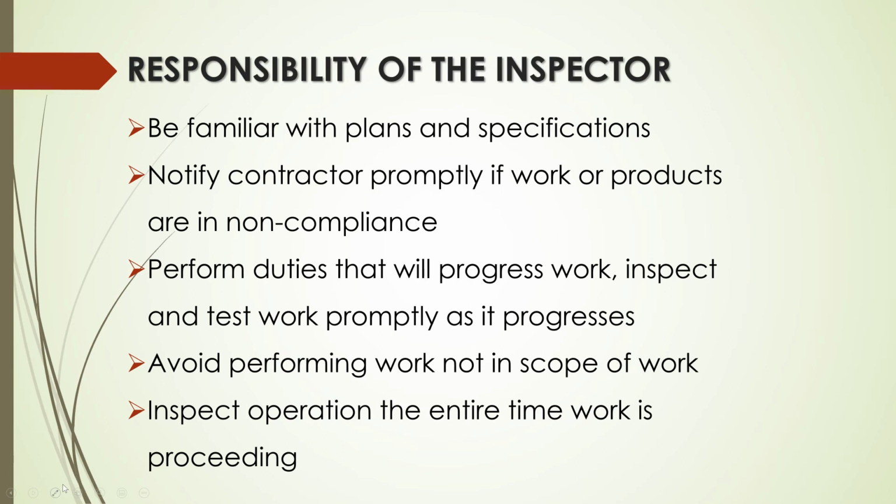Now, sometimes they don't want us there full time because of the cost. And then something goes wrong, and they try to blame it on the inspector. But our contract will say daily reports, and we'll go over daily reports. Well, we were only there part time, so there are gaps when we weren't observing the construction, so we can't be liable for that.